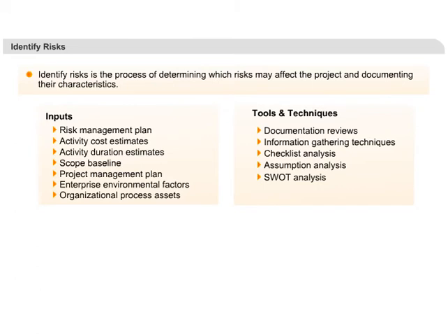SWOT analysis, or SWOT, which stands for strength, weakness, opportunities, and threat, is also used to analyze project risks. Usually, these analyses are done at the organization level first, and later the findings are applied at the project level too. For example, the organization has very good technology strength, and that can be a strength for the project as well. Similarly, if the organization's infrastructure is not that good, it could be a potential risk for the project as well.